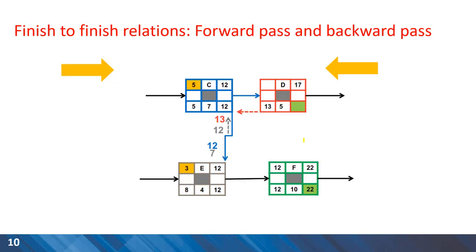Here is an example of a network containing finish-to-finish relationship. As you can see in calculations of the forward pass for activity E, we have two options for early finish. The earliest start for E is three days and the duration of four days. One option for early finish is seven days.